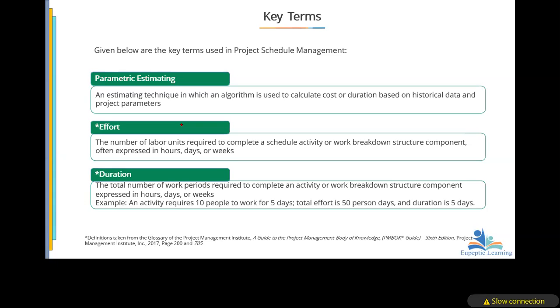You did this project some time ago, and it took you about five weeks. And you are saying that you are certain that, because in terms of size and complexity this project is also like that, it will take you what weeks? Exactly. So that is the analogous estimate. Now the question of effort and duration comes in.